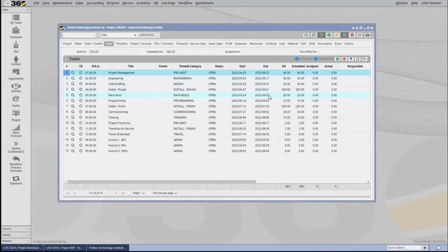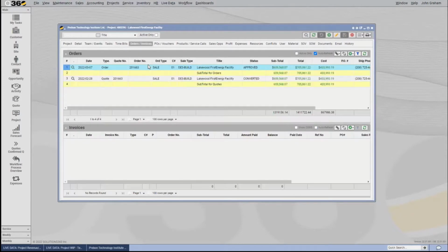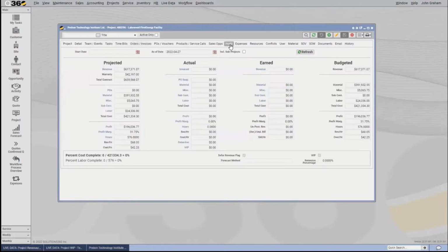to take. And our original sale orders and the quotes as it was sold come into our project. As a result, the system will automatically build that profit tab. It shows us our projected profit based on what we've sold: equipment, labor, subcontracting, anything that we've sold, and how many hours we've sold. And it sets up our profitability to be managed.